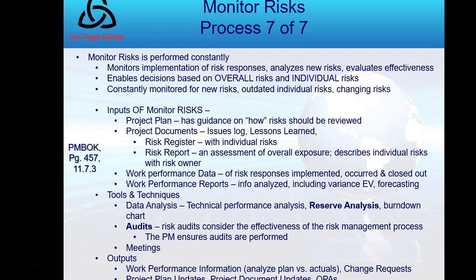My tools and techniques include data analysis, which has two forms: technical performance analysis and reserve analysis. Audits. Audits are another tool. We should expect risk audits, just like in quality we encourage an audit, to consider. We want risk experts to come and tell us how effective is our risk management process. There's no pride here. I want you to tell me in advance if I've made a mistake based on best practices or current information, because I want the threats to be mitigated and the opportunities to be enhanced.